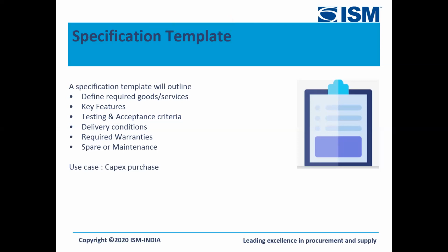Then required warranty, spares and maintenance. Now, it depends on how we want to work. If we are a completely greenfield project, we tend to look for products with everything attached to it, at least so that we are covered for the coming next 2 or 3 years. We had a practice where we asked for a maintenance engineer to be available in say 2 days at a site if required, and that was the requirement we conveyed to the supplier.